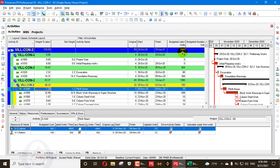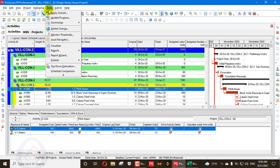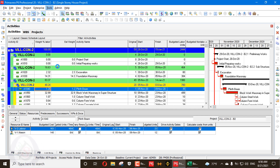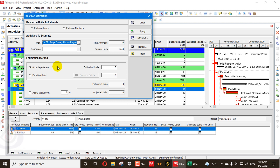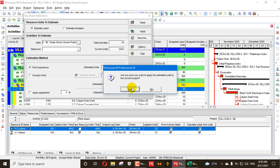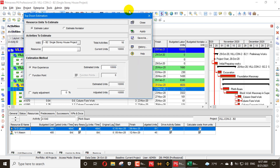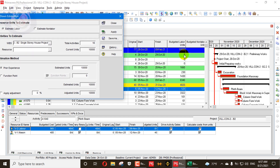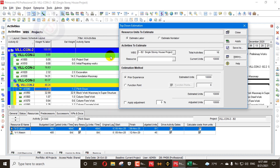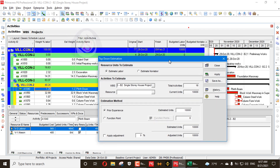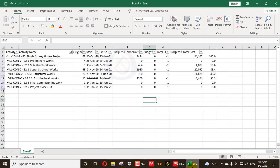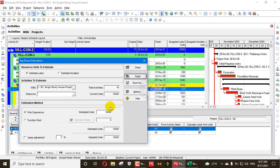My budgeted labor units are 2,444. Now I'll apply top-down estimation. I'll assume my total budgeted units are 10,000 and apply for labor on this project. You can see all the estimated units are now applied using the estimated weightages I entered — the total is 10,000 distributed across activities.